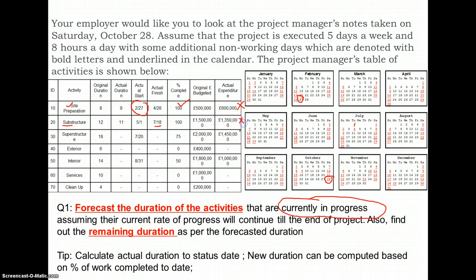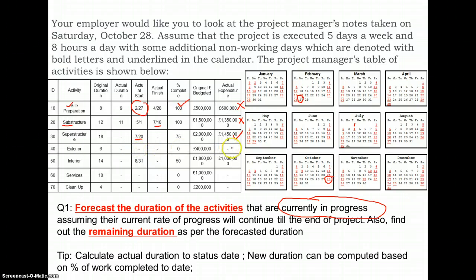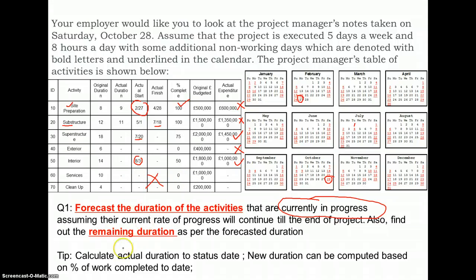The superstructure activity started on 27th of July and is not yet complete, so this is an activity for which we would like to report progress. Exterior works has not yet started — it will start at some point in the future, so we are not going to report for this activity. Interior works started on 31st of August and is still in progress, so we will be reporting it. The other two activities have not yet started.